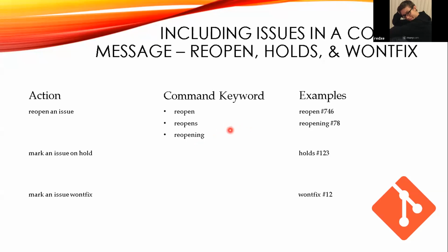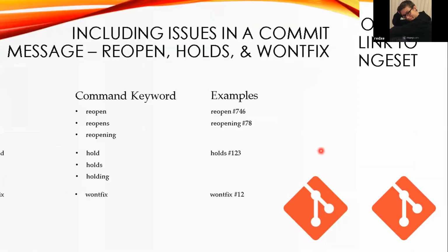You can also mark an issue as being on hold, and that's to say, I plan on fixing it, but at the time I have other priorities that I have to take care of before I can actually get to fixing your issue. Again, you would use very similar syntax where you have the keyword, and then the number of the issue that you plan to fix.